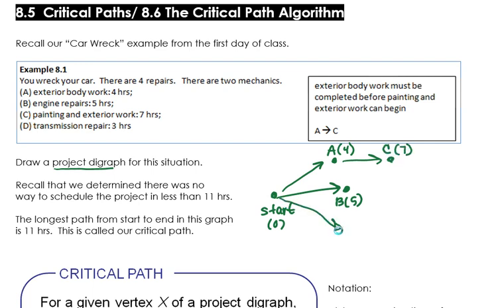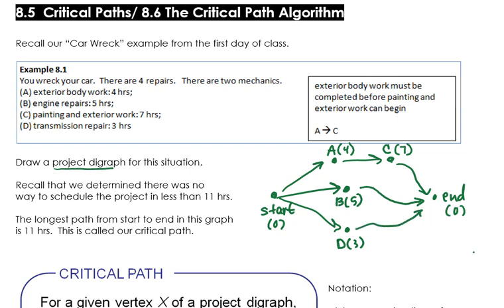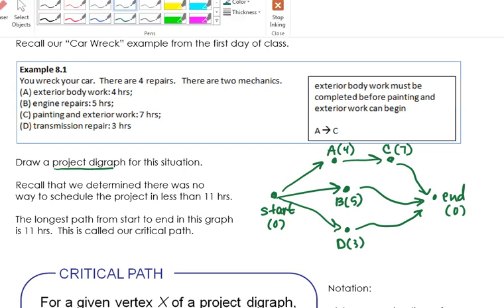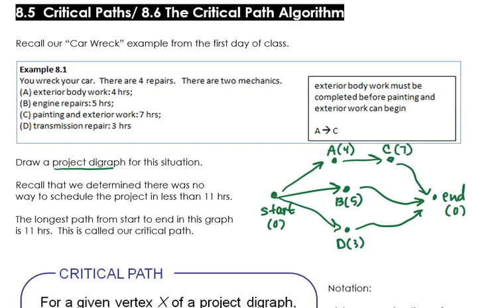I could also start task D right away as well, and that was three hours. Once I get to the end of these strains, I don't have anything else to arrow over to. Here's my project digraph. We want to determine a way to schedule this. We determined we couldn't do anything in less than 11 hours. The reason why was because of this path up here. A has to be done before C. A is going to take us four hours, and C is going to take us seven hours. So no matter what we do, this project is going to take us 11 hours no matter how many people we work on it.